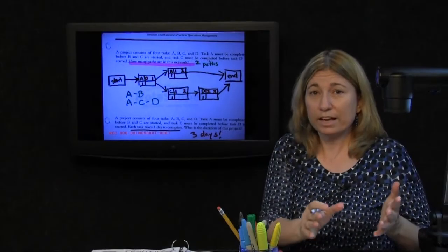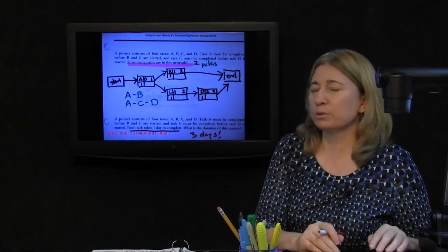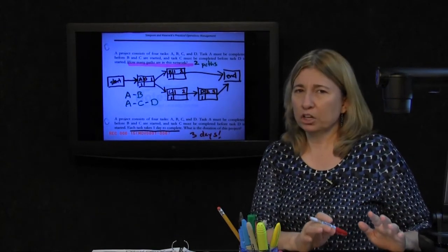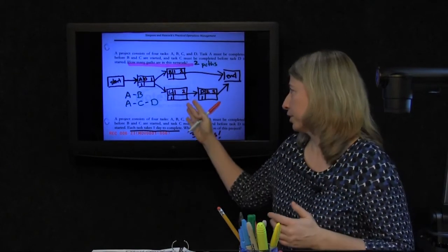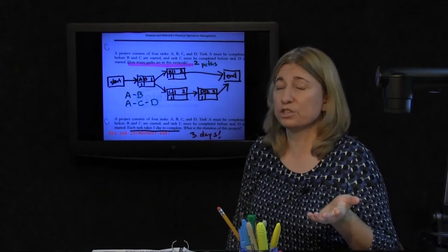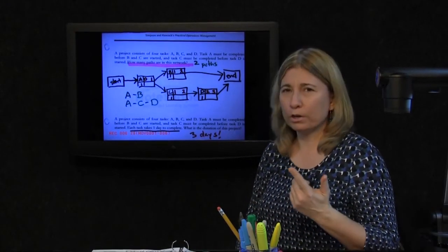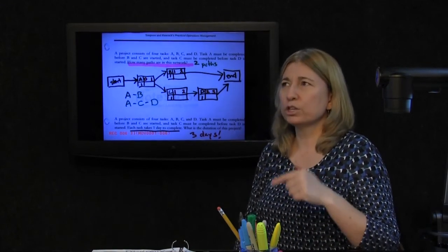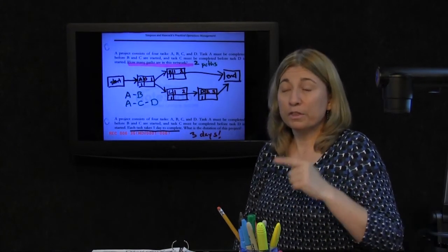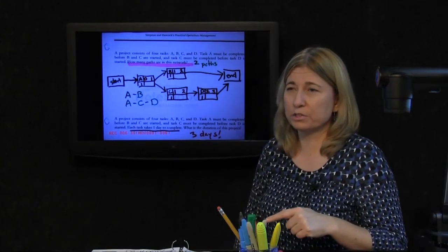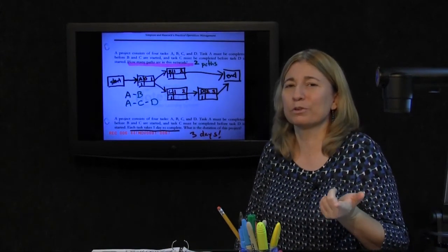Okay, that's the answer. Though I wanted to point out really quick, in case you were interested, there actually was, for this particular problem, another faster way to work it. This particular project only has the 4 tasks. It only has the 2 paths. We knew that from the question before. We remember also that the duration of the project is the length of the longest path. This project only has 2 paths, so it actually would have been quicker to figure out the length of each path and to look for the largest number.